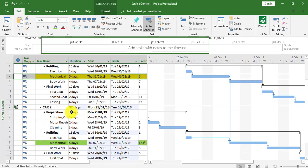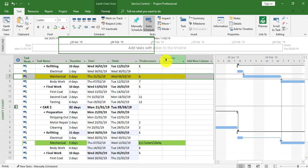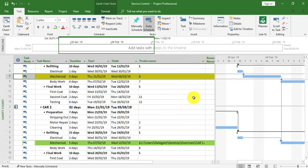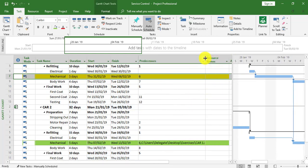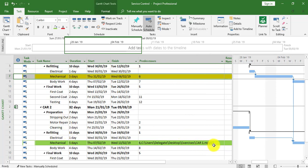We're now going to see what happens if we change the link. Before doing that, let's check how the link looks as an external task link. I'll pull the dividing line across for the Gantt chart area and extend the Predecessors column. I can now see that the mechanical task within Car Two is linked to Car One, specifically task seven, as a finish-to-start link.